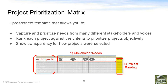After identifying the stakeholder needs, you'll be able to prioritize those since not all the needs are equally important. Secondly, you'll be able to list out the projects and rank them against the criteria to see which projects scored the highest across all the different criteria. At the end, you'll come up with a ranking that lists the projects from highest to lowest based on their score. This also allows you to show the transparency of how projects were selected.